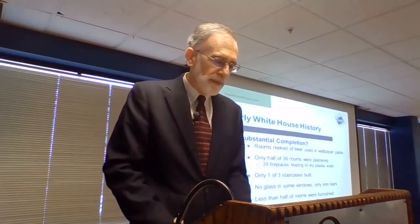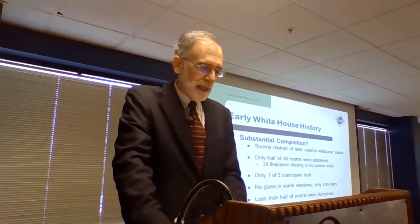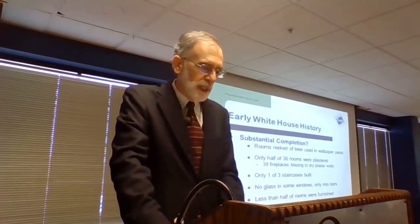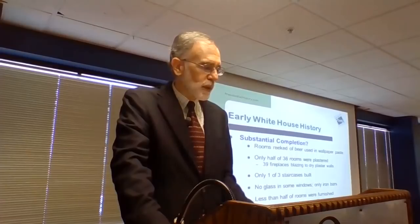The rooms all reeked of beer because they used beer in the wallpaper paste. Only half of the 36 rooms were plastered. They had 39 fireplaces that were blazing away to dry the plaster walls. They only had 1 of 3 staircases that had been finished. There was no glass in some of the windows, only iron bars. Less than half of the rooms were furnished, and some of the rooms were used as storage. So this was a very primitive type of setting that Adams moved into initially.